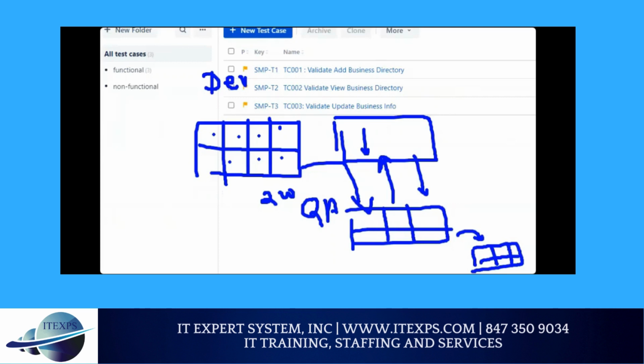Right now I'm creating hypothetical cycle because we don't have multiple sprint. But if you have multiple sprint, sprint 1 complete, then things will go to QA environment. Then sprint 2 completes. Then the first will go to UAT, and the second one will go to QA like that. So this is like a chain of reaction. So overall, it takes around 4 to 5 weeks to production.